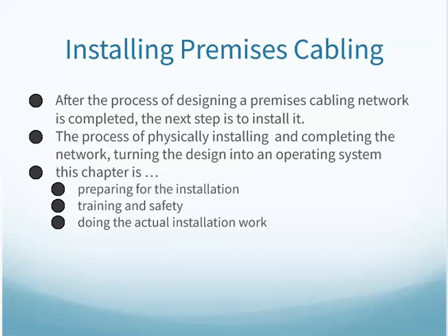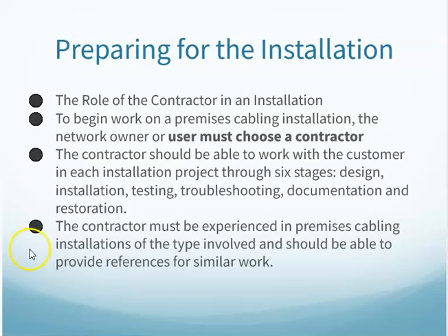After the design, the next part is the install. This process is actually pulling the cabling, terminating, testing, troubleshooting, fixing, and then documenting and turning over to the customer. So there's a lot of prep, and then actually doing the install. The first part is preparing.